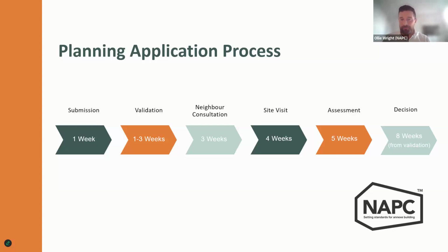Perhaps they're not overly happy with the materials. Can we change that? And then we'll try and find a compromise and obviously come back to you as the client to make sure you're happy with those suggestions. And that really helps. Being proactive with the officer can really help get that decision through during those 8 weeks. Because if they just refuse it, you then have to resubmit and go through the whole process again. So we like to get in there quick.